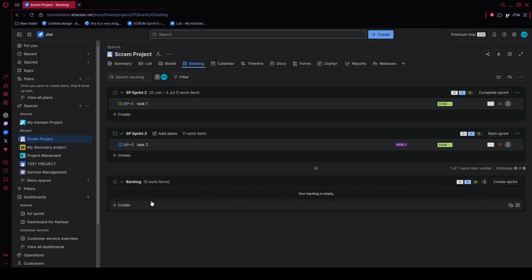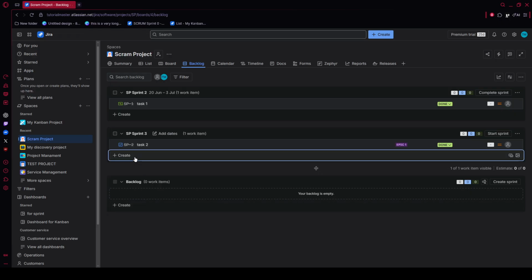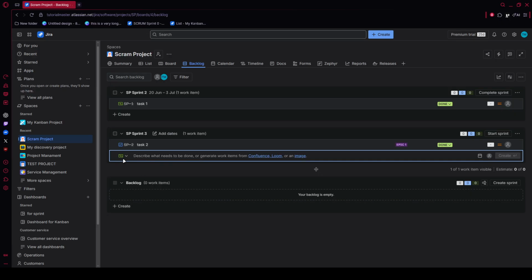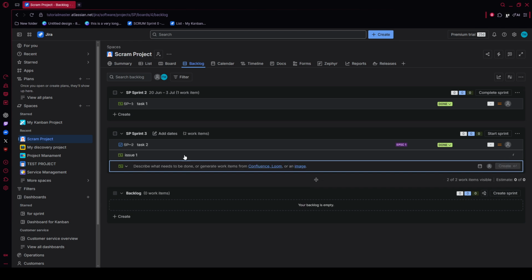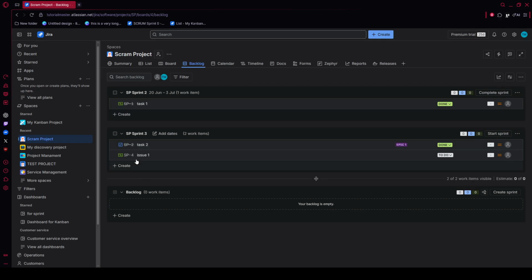At the bottom of the backlog panel, click into the Quick Create area and enter a clear user story title. Keep it short, specific, and easy for the team to understand at a glance. After you press enter, Jira will create the issue for you. From there, drag and drop backlog items into the order that best reflects business value and delivery priority. Put the most important work at the top so your team always has a clear sense of what matters most.